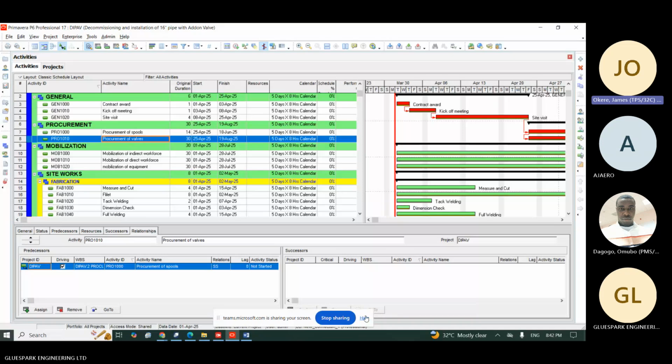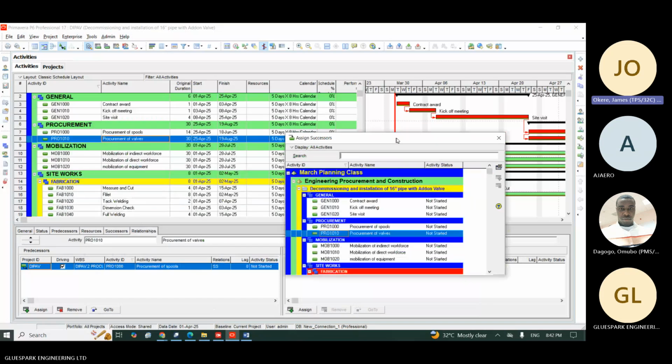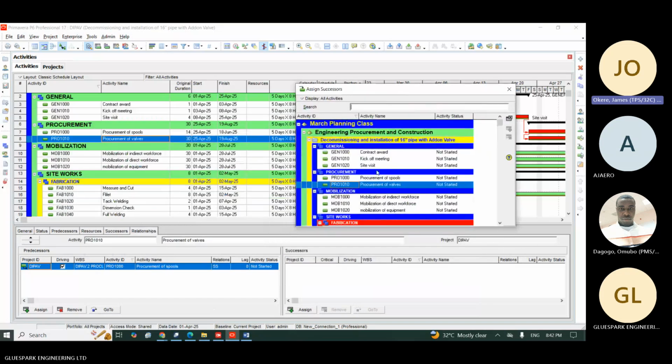So I will go back to assign and open the assign box. Under assign, I will say the successor is the next one, procurement of valve. I'll go to the next one. I'm not clicking the WBS. Take note, all this time I've not been clicking these WBS, the general, the commissioning and installation. Watch, if I click them now, you find out that this sign will be faint. If I click on WBS, here is faint. It will not give you room to assign.